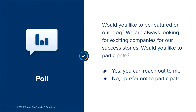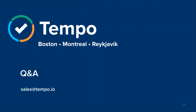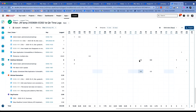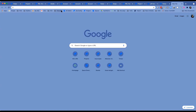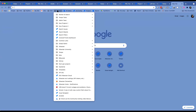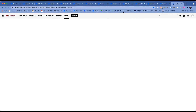John, this is a good question: how do people log their time? Do you have a favorite way of logging time, and how do you prevent people from logging time to a project or customer that has been closed? I can share my screen and show you. There are many different ways of logging time. One thing I do is go to Tempo My Work. You get a search panel with recent issues, assigned issues, and favorite issues, or you can set up your own filters. I'll search for a ticket, drag it over, put in the amount of time worked — say, 1.5 hours — and click Log Time. Done.